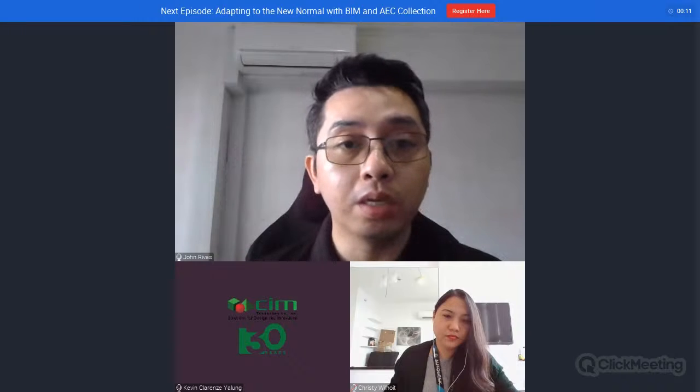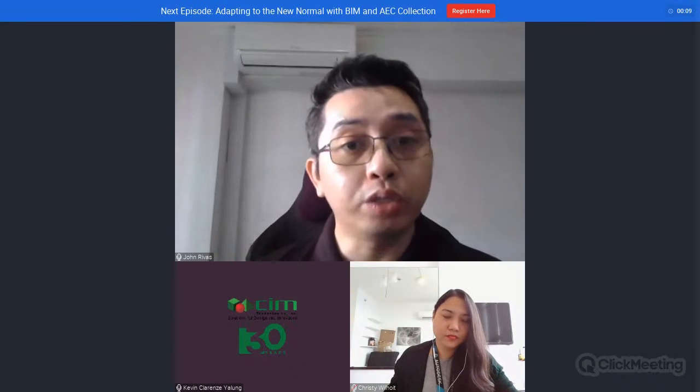What information do we have to develop in BIM? Whether it's for documentation, quantification, or even coordination, it is important to specify which milestones we should address with BIM, and then from there you can define what level of detail you have to put in your BIM application, or in this case, Revit.